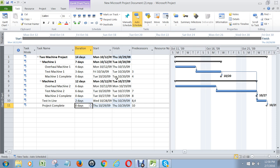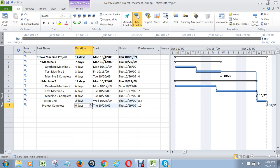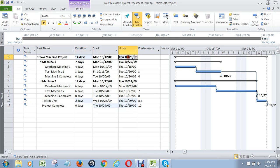So at this point now we have our project. We know when everything should start and when it should end. You can see that the entire project should start on the 12th of October and it ends on the 29th. And if I don't like that start date — maybe I want to start it today or some other day — I would go to Project, go to Project Information.